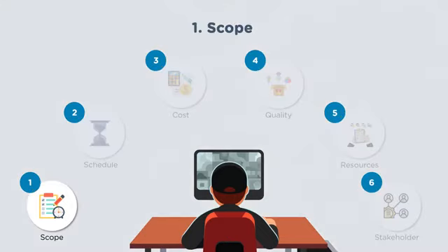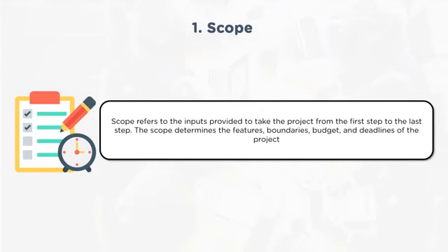What does scope mean? Scope is about what needs to be delivered. What is in scope? What is out of the scope? So this refers to all those deliverable scope, all those activity scope. Basically we speak about 2 things. One is product scope and the other is project scope. Product scope is all about ensuring the features and functionality of the product are well defined, understood and signed off. And while delivering that product, it is tested against those defined features and functionalities.